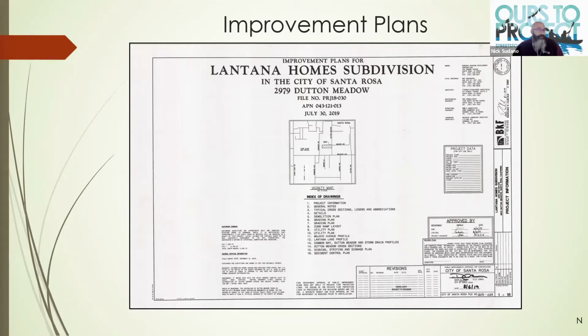And for those of you contractors on the phone call, one of the better things that you could do is to take photos of your completed LID features, because there is a lag between city acceptance and after you install them. And sometimes you do have homeowners that move in and alter these features. And so that photo helps us to really know who to hold accountable to get that feature back into compliance the way it was originally designed.